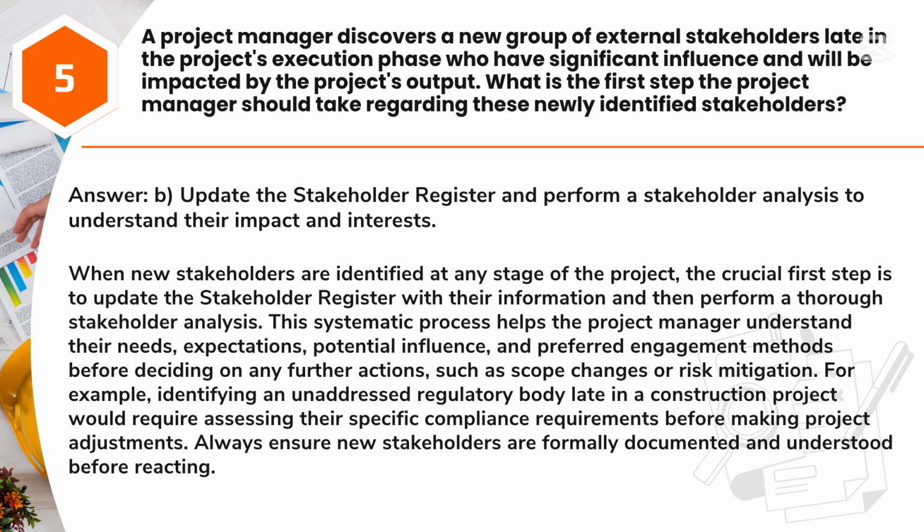For example, identifying an unaddressed regulatory body late in a construction project would require assessing their specific compliance requirements before making project adjustments. Always ensure new stakeholders are formally documented and understood before reacting.